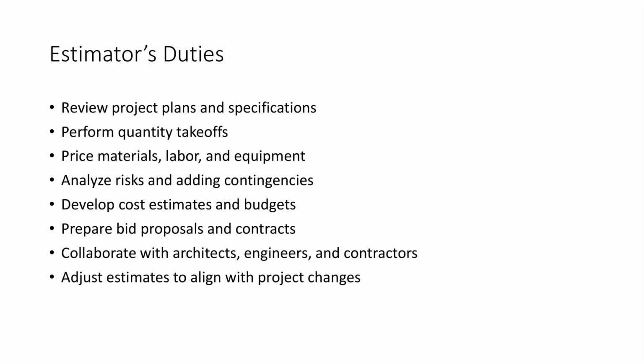Or if you are competing on a project, you develop a bid document, which may or may not correspond to the actual estimate. So in this case, let's say you really need to take on a job because your company needs to get more revenue, or you have workers or equipment that are waiting for more work. In those cases, the bid that you offer might be lower than the actual estimate that you have for the cost of the project.